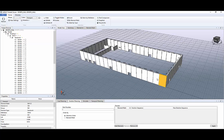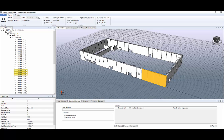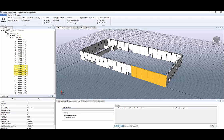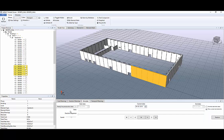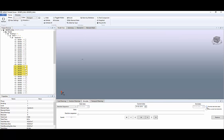So first we will start with erection planning. Just hold ctrl button and select the sequence you want to use and add elements to the list and apply. If you go to simulate erection and set the elements for the erection sequence you can see the simulation of the erection planning.